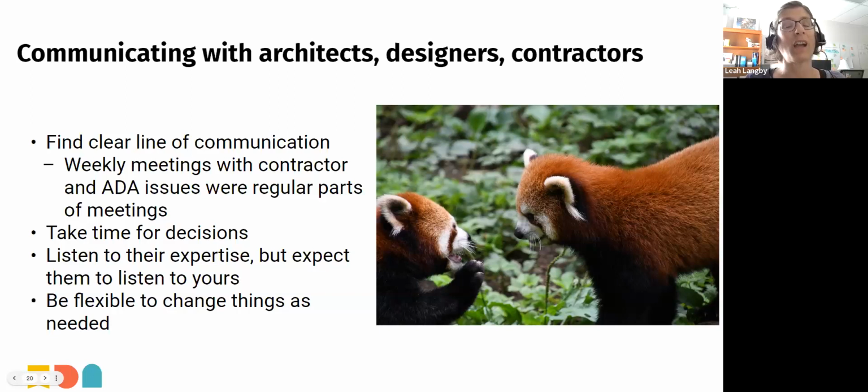We tend to trust the contractors to be keeping ADA compliance in mind along with all the other building codes, but sometimes they aren't as on top of this as we might think. So for example, don't assume your contractor is keeping track of the steepness of the slopes in your curb cuts and parking lot and accessible spaces, even though they should be. Even in newer building projects, this is one of the most common areas of concern, and it's much easier to get it right the first time than to correct it later.